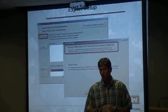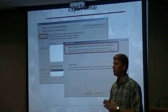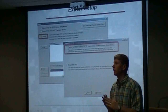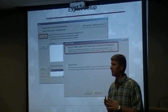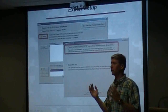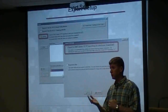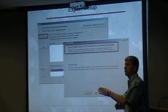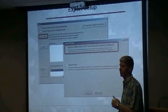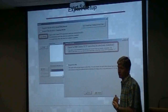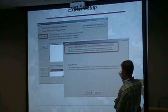Some companies decide to have a dedicated person who makes sure QCS is up to date and does all imports and exports with the government. We have companies that have that policy. I don't recommend it, because typically the guys in the field know better when to import-export than the home office does.